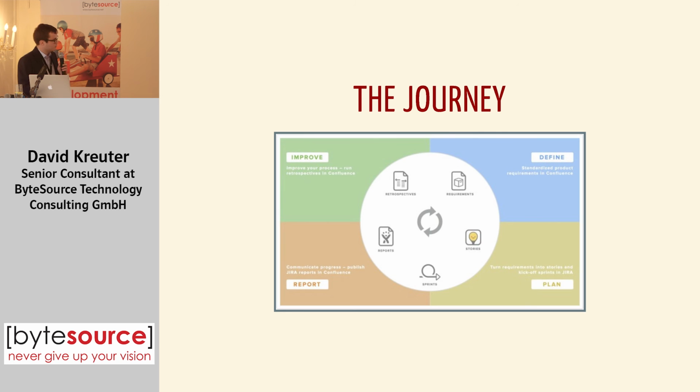The journey. We're going to start here in Confluence, where we define our software specification using templates. So we have a consistent view on a specification, then we move it with the first-class integration to Jira. So we create a user story in Jira, link to this specification, and then we implement this using Stash. We make a live commit based on this story, and then you see this automatic transition from open to in progress. This will be part of the Bamboo Stash session. We report back status, for example, for business people who want to follow the progress. And then here is the section improve. It's all about improving your content in Confluence and really acting on this content. But I will tell you more about it afterwards.